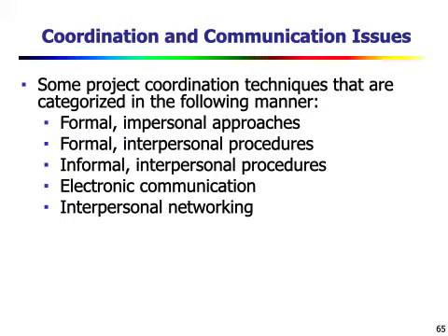At the minimum, the scope of the project must be established and bounded. At least that much should be done before software project planning begins. So the first software project management activity is the determination of software scope.